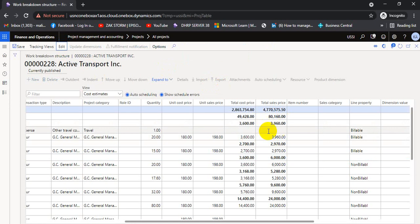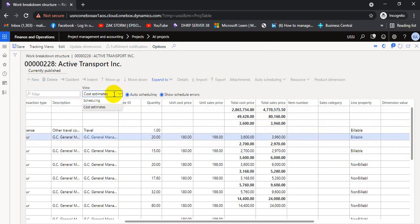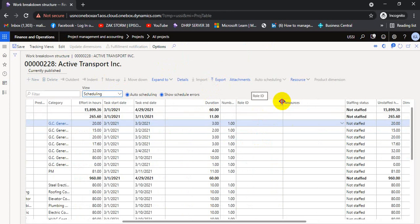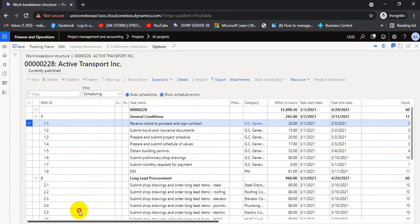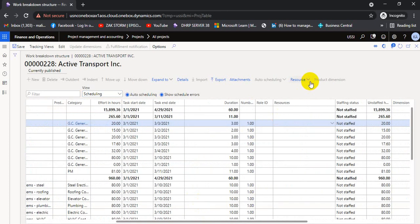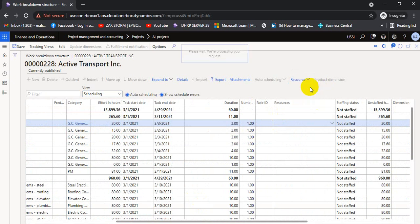With the WBS published, we go to the scheduling view. We want to allocate resources to the project. We click on a WBS line, then go to Resource, and click to assign a resource. Resource assignment can be a hard assignment or a soft assignment. We can assign resources at the project level or at a specific WBS line level.